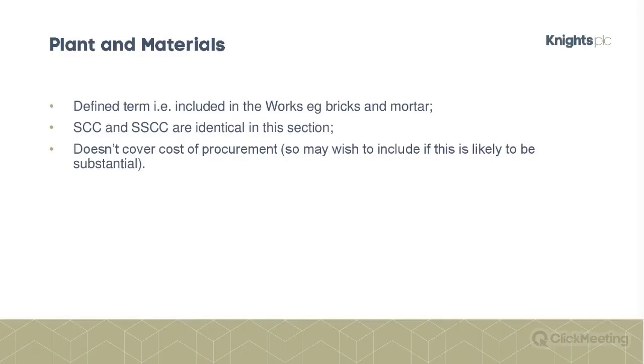And also, as we've already seen, you can claim the cost of the operatives, providing you haven't already claimed them in the people section. So no double claimings allowed. So some fairly obvious ones there.